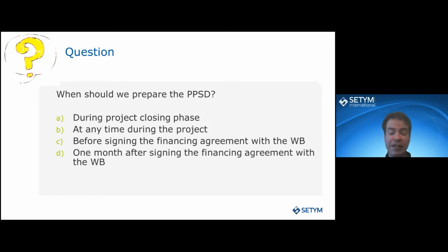So it feeds into the PAD, Project Appraisal Document, and it determines the procurement plan, and all of this has to be done before the financing agreement is signed. The best parallel would be with all the preliminary studies. So things like financial capability studies, environmental studies, and so forth, are done before the financing agreement is signed, and they modify what happens during the implementation phase.